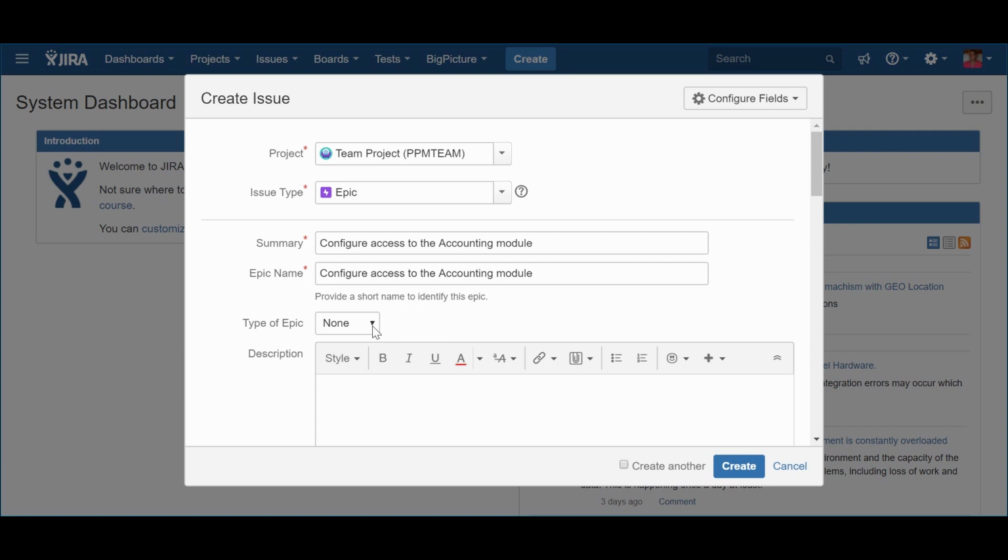Type of epic. The type of epic is what will allow you to know if it's focused on business functionality or more about the enablement of those epics. As you have already seen by now, the concept of enablement is ingrained in the model I proposed at different levels of the solution. An example of an enabler epic is the development of some architectural components that can be used to build and materialize the solution architecture.